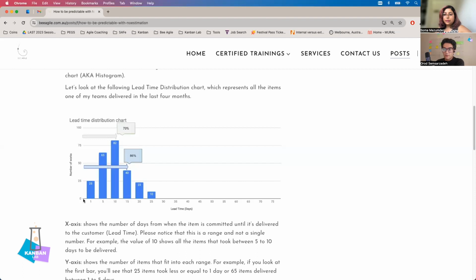So correct me if I understand correctly. What you're saying is the customer comes with a task we haven't estimated. So basically, without estimating the size of the work, we can guarantee 86% finish in 15 days or 100% in 25 days. Of course, there is no 100% guarantee because there is always a chance that something takes more than that. But this shows us what happened historically, and we expect anything that happened before is more likely to happen again, right?